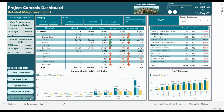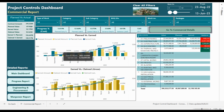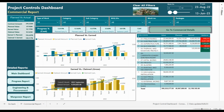Now finally we will go to the commercial report, which is a very important section. On the left side there is the contractual amount, planned value, actual value or earned value, the claimed amount, and the percentages — earned percentage of planned and claimed percent of earned. In the middle we can see planned versus earned amount based on the project and the BOQ, and then the earned amount versus the claimed amount per month with cumulative figures.